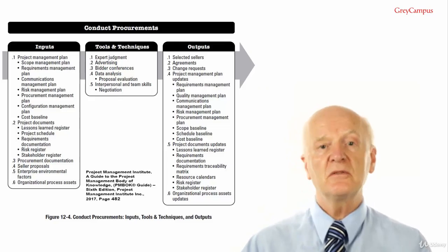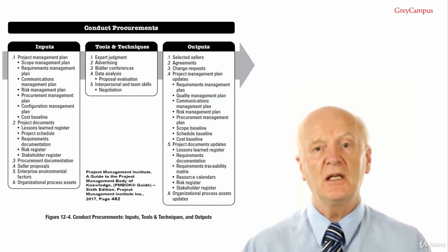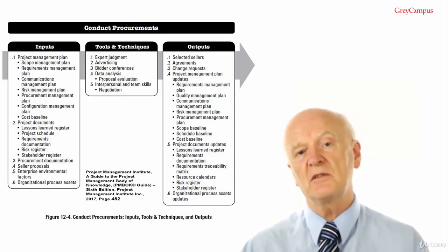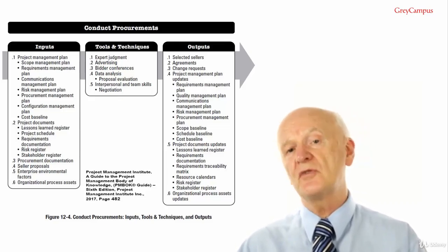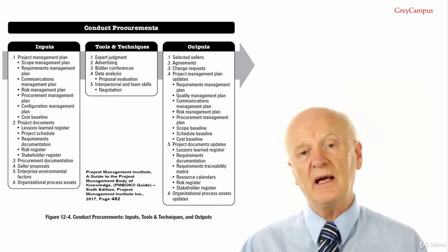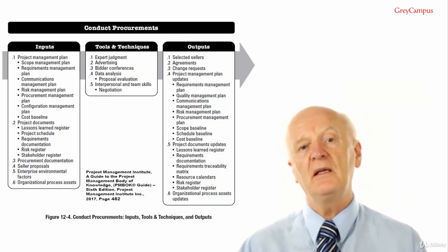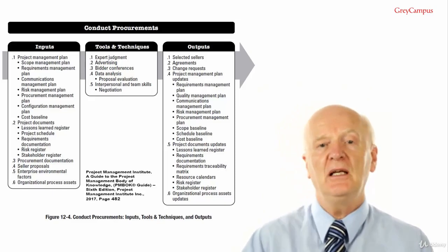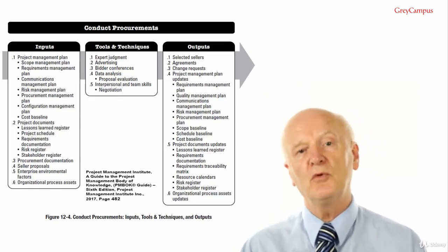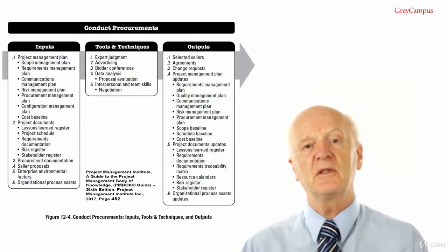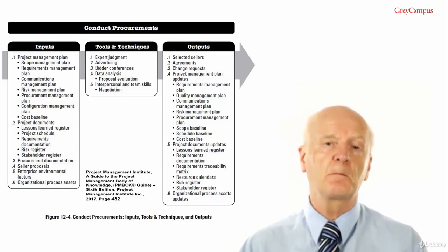General terms and conditions, change request handling and termination clause, and alternative dispute resolution mechanism. Now the termination clause, that could be just you've reached the end of the contract, everything's done, everything's been handed over and signed off. What do you have to do to finalise? Or it could be everything's gone pear-shaped, that nobody likes what's been done, or it's behind, or they're trying to get more money, and huge disputes, and that's where the termination clause kicks in. So it needs to be a fair bit of work gone into that from both sides.